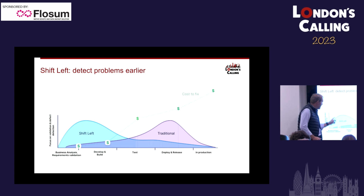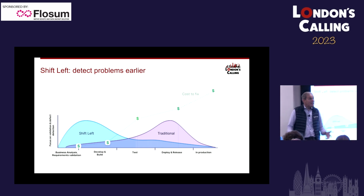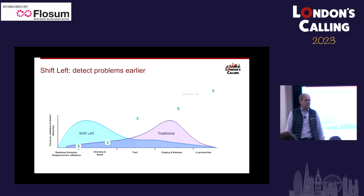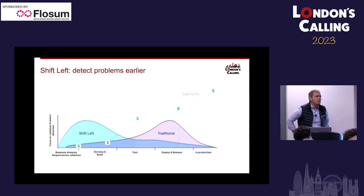And at that point, with a shape, you should also understand what you're going to change in the org, such that you can actually determine that this field, those guys are trying to add a pick list value, and those guys are going to add a pick list value to the same field. That has happened to us. Okay, let's schedule that. Let's work out the implications of that before we discover that down here when we stamp on each other. So again, another long answer to a question, but I hope helpful.